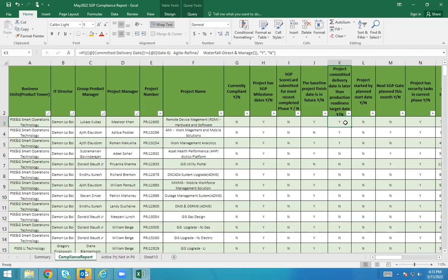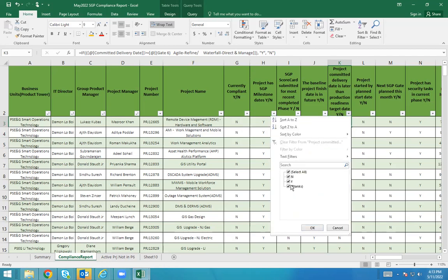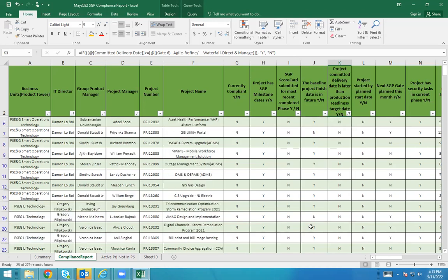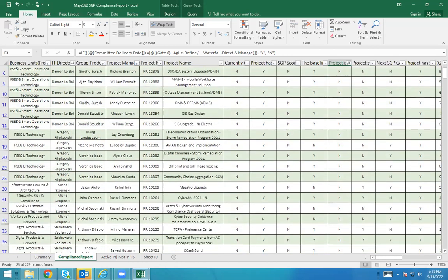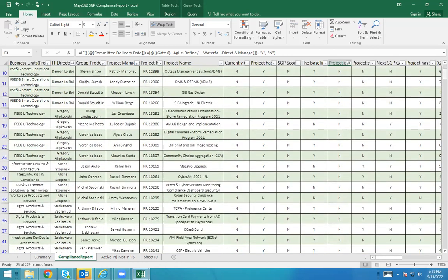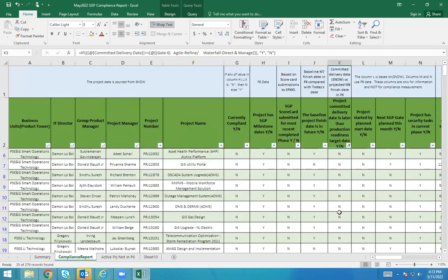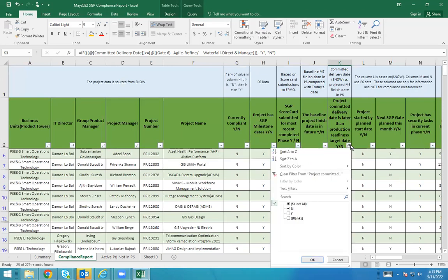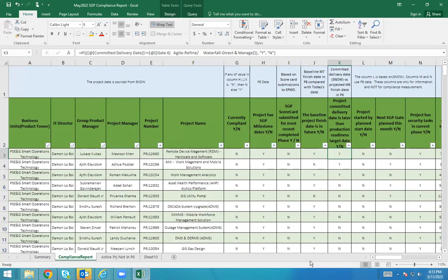Right. Okay. And again, if you can see, there are quite a few projects which have passed. You are doing this report, I believe, right? The committed delivery date. Yeah, the CDD pass. It is CDD. Pretty much, you will see that a lot of projects are past committed delivery. So either you have to correct the delivery date or the project should be marked red.